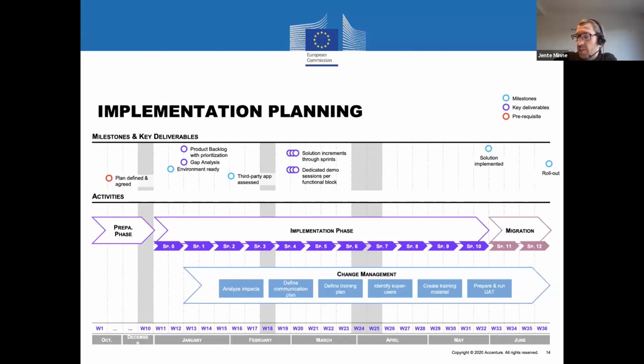Basically, what the agile way normally says is, you give me this budget, and I'll take care of this budget. I will follow it up in a good way, so I'll manage it in a good way. But you cannot ask me for a fixed scope for this. For this budget, I will see where I get, and I know the scope will change. I embrace this change. I will follow it up as much as you want, so you can have your say about it, but don't expect from me a fixed scope for this budget. And so that's not really easy for boards of directors sometimes too. Right, and chief financial officers, exactly, they might have a problem.